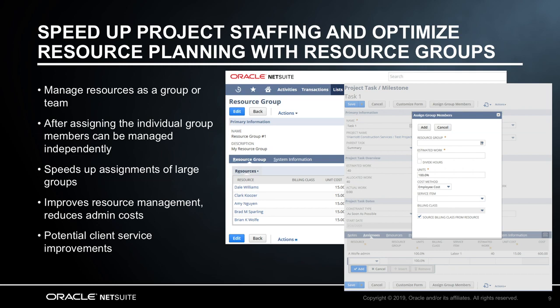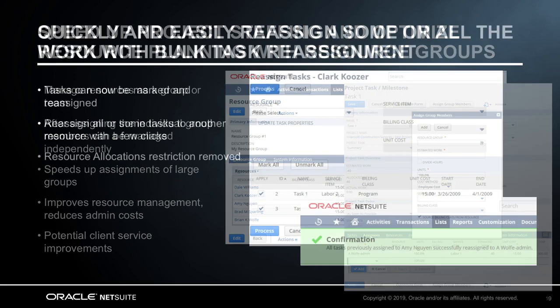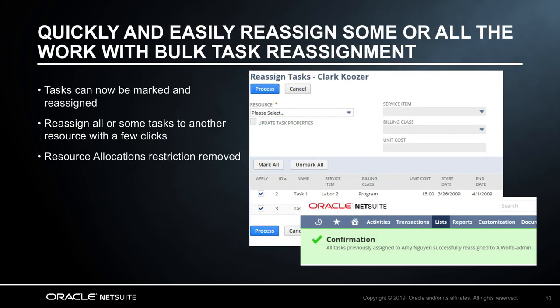When dividing the hours, the total estimated work will be divided by the number of resources in the group. For example, I have a task that's planned to take 30 hours, and I have 5 members in the group. I can either assign all 5 members for 30 hours each, or divide the 30 hours among them, giving each of them 6 hours. This feature is ideal for design or video production studios within an advertising agency or creative firm.